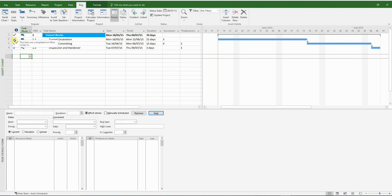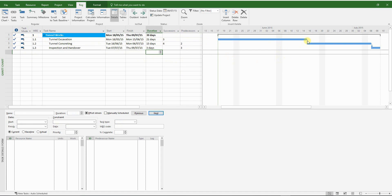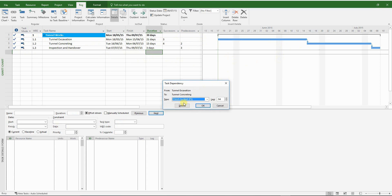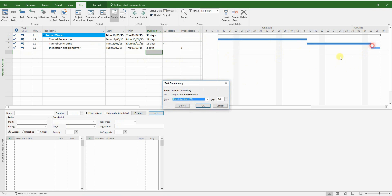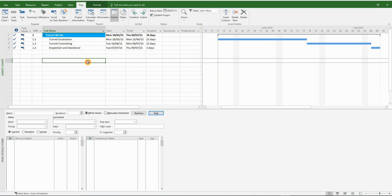So this is your as-built program. So now you can delete the links between the activities and it won't make any difference to the finish dates. Because once you have your actual as-built dates, network logic doesn't function anymore.